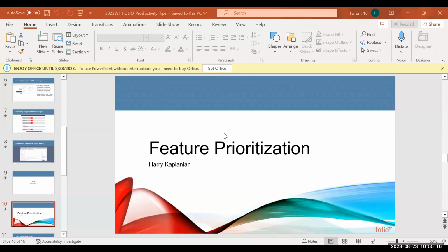It's a plus the time criticality. And then plus, does this provide an opportunity or enable an opportunity? Or does it help us in terms of risk reduction? Both of those are oftentimes equally valuable, but in each particular feature, it's typically one or the other. And so we can sum those up and divide it by the job duration.